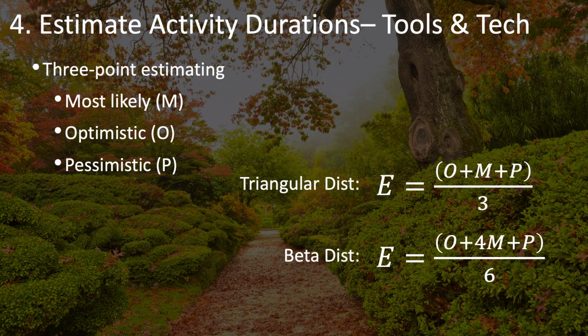If, for example, you find that the pessimistic estimate is 2 or 3 times longer than the most likely estimate, that tells you there's some significant risk involved in this particular activity. And it's worth spending some time with your team members to explore these risks and see if you can better understand this activity and if there are any opportunities to mitigate these risks.